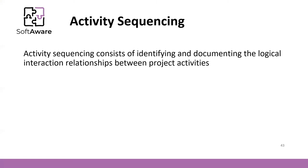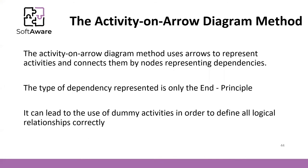You have to build the Activity on Arrow diagram method. The Activity on Arrow diagram method uses arrows to represent activities and connects them by nodes representing dependencies. The typical type of dependency is end-to-start, which means that once you have a node after another node, that node represents a work package or task or activity, and it must end that activity before the next one starts. Sometimes we have to use dummy activities in order to define logical relationships correctly.